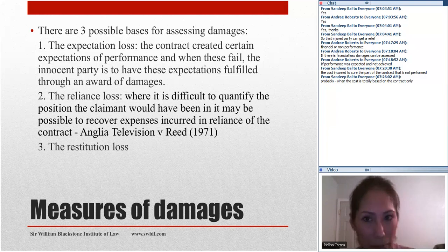The claimant, the injured party, is the party who decides whether to seek his reliance losses or his expectation losses. The claimant cannot seek to recover his reliance losses where this would have the effect of allowing him to escape the consequences of a bad bargain. Let's remember the last case that I mentioned, that is CMC Haulage Company versus Middleton. Okay,